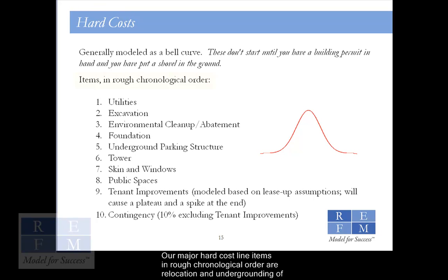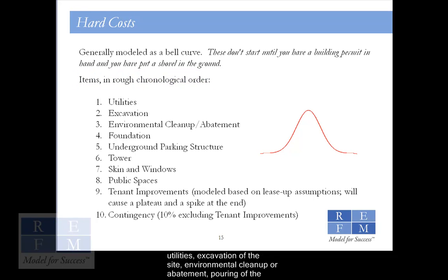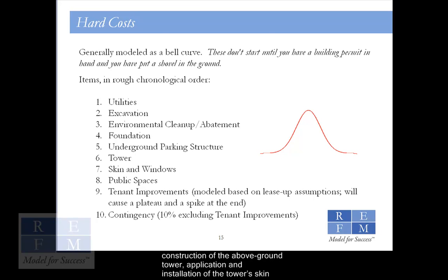Our major hard cost line items in rough chronological order are: relocation and undergrounding of utilities, excavation of the site, environmental cleanup or abatement, pouring of the foundation, construction of the underground parking structure if the building has one, construction of the above-ground tower, application and installation of the tower's skin and windows, and then construction of the public spaces.